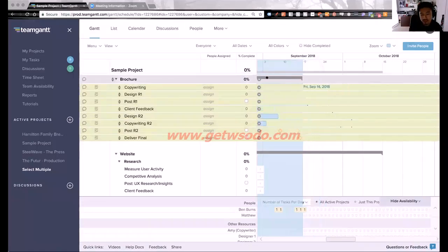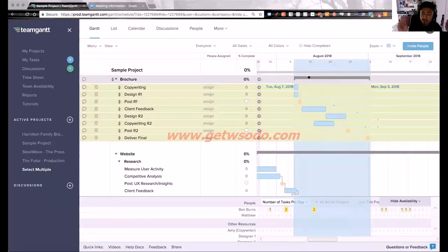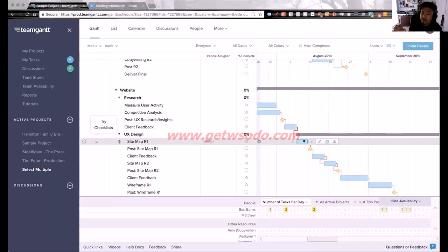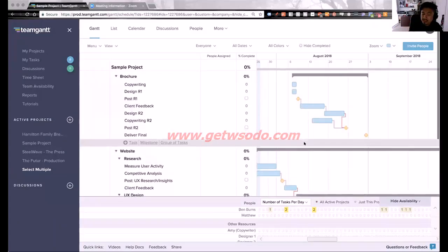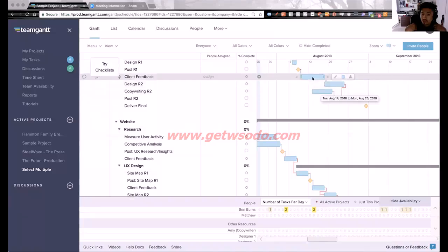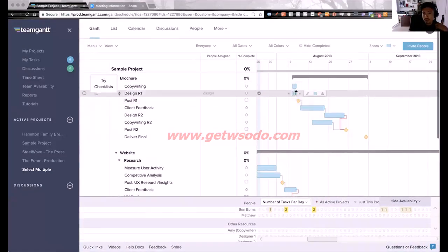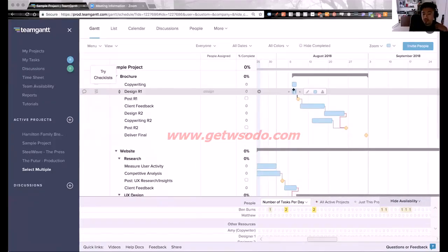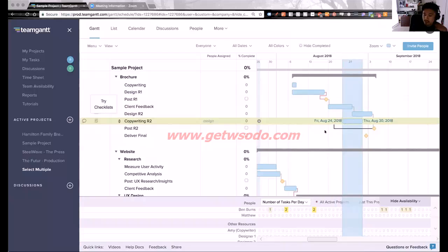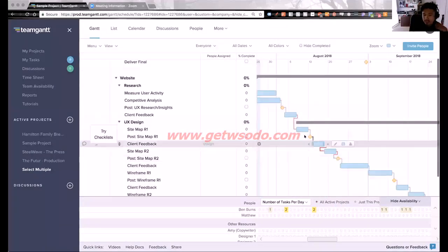But at certain points, we could say that, hey, we have 10 projects going on. We scheduled and booked a team just for you on this one. In order for us to have this delay and stay on schedule, we need to bring on additional resources to get these tasks done on time. Therefore, we have to charge you a change order or an overage to make sure that we are able to get everything done per your schedule. So you can easily justify that. You can see that through the calendar here.